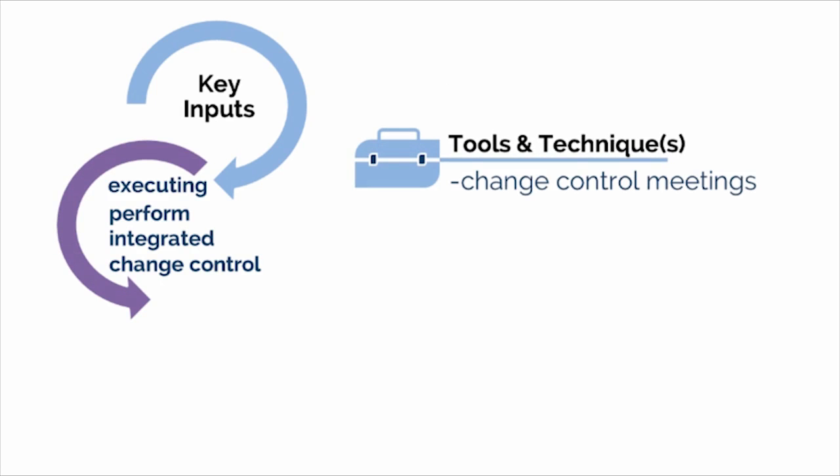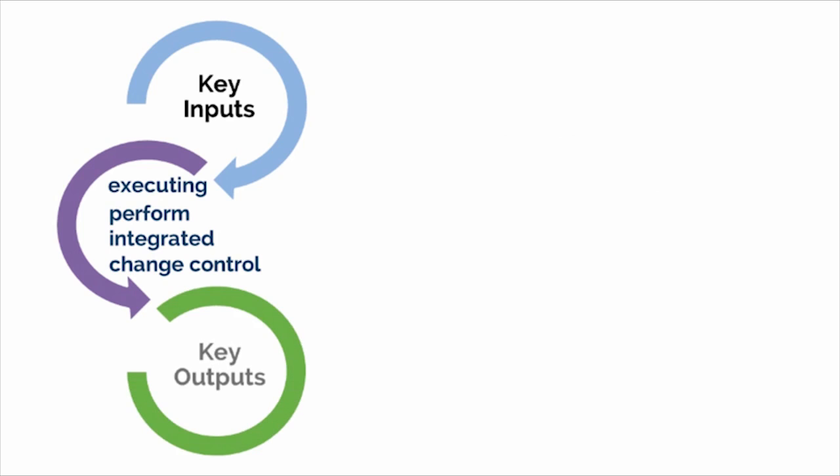A key tool and technique is change control meetings, whereby clear procedures and guidelines are established, and the Board will review all submitted change requests and determine which ones are approved or rejected. The key output of this process is change request status updates, whereby the team can take action on the approved change requests.